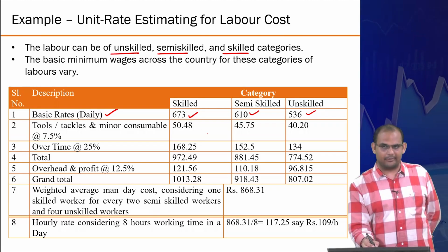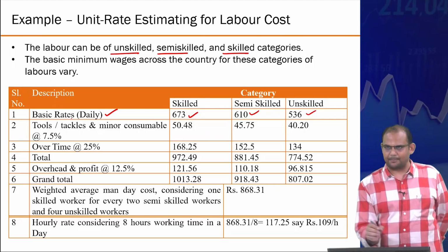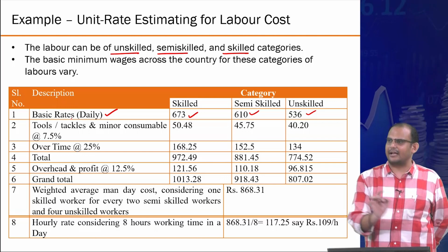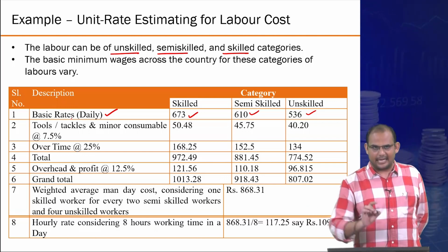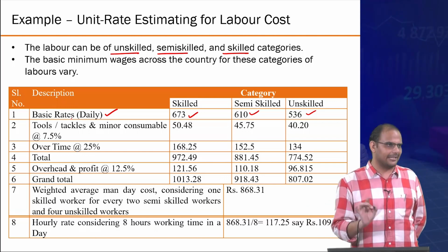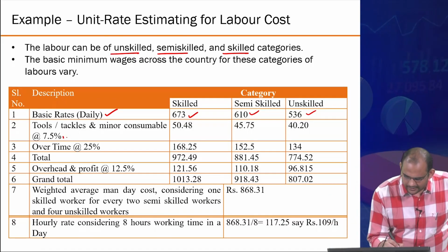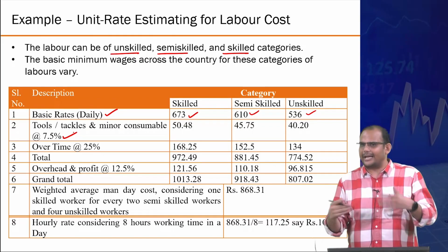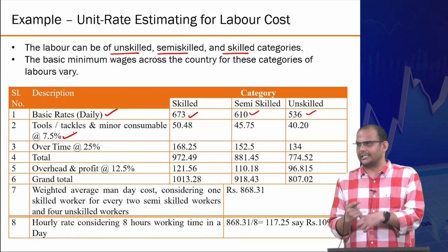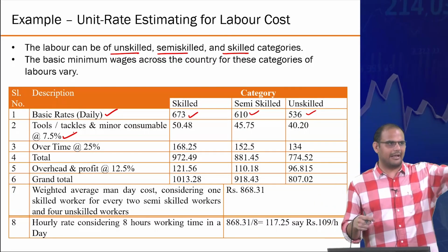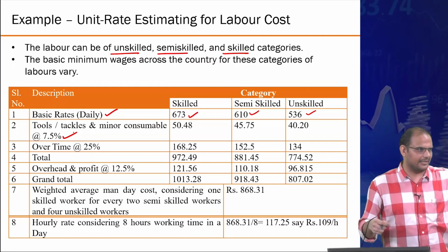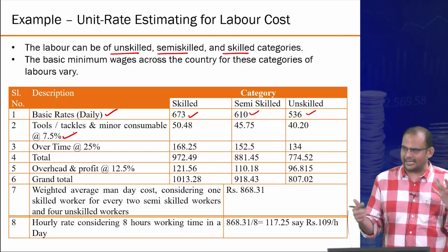This is not per hour and this is also not per day. I am assuming that in a day they are working 8 hours. Again, you need to know this convention about the industry in order to get this. They also require some minor tools which they usually carry with them, for example a mason would have a plumb to check the level and all those things. They always carry them, so you need to pay for that.